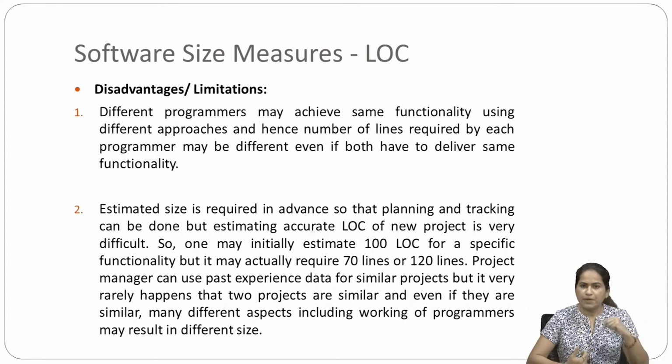So the number of lines required by each programmer may be different, even if they both are trying to deliver the same functionality. So at that time, if you are measuring this size, then it will be of no use, because one programmer is writing the functionality with the help of 10 lines, and the other programmer is writing the same functionality with 20 lines, or it may happen that he or she is writing with 5 lines. So this difference will also be affecting. So in such cases, this is not going to help.